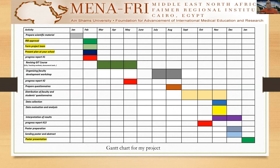After that, we will distribute already prepared questionnaires after finishing the GIT course this year for faculty and student satisfaction. Then data collection, evaluation, analysis, and interpretation of results will be in September, October, and November 2021. The third progress report will be submitted in October 2021.